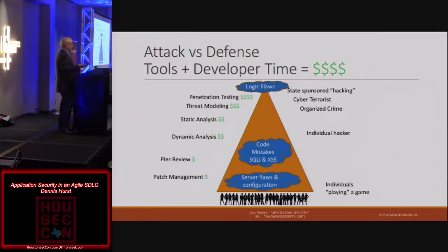It's just impossible. Where I've had a lot of success with companies, and I can almost tell you in the first week if I'm going to be successful or fail when I'm working with companies, is if the development team owns that. So if they go, oh, we like static analysis, we understand that, we're going to own that. We understand dynamic analysis, and the QA testers figure out how to execute those tasks. Or code peer reviews, if they actually get educated. If the development team owns it, and as security, you've become coaches, mentors, standard setters, you're probably going to be successful.